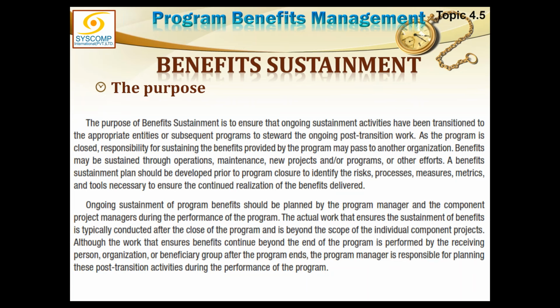As the program is closed, responsibility for sustaining the benefit provided by the program may pass on to another organization. Benefits may be sustained through operations, maintenance, a new project, or a program, or other efforts. The benefit sustainment plan should be developed prior to the program closure to identify the risks, processes, measures, metrics, and tools necessary to ensure the continued realization of the benefits delivered. Ongoing sustainment of program benefits should be planned.